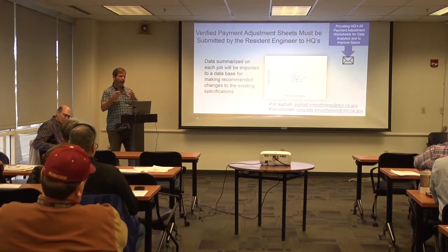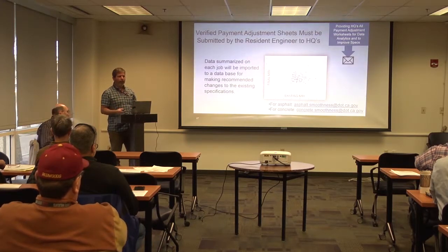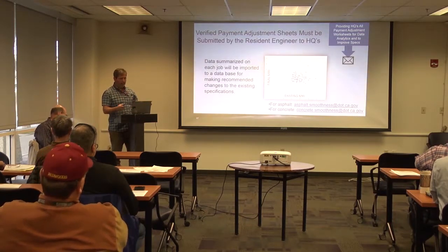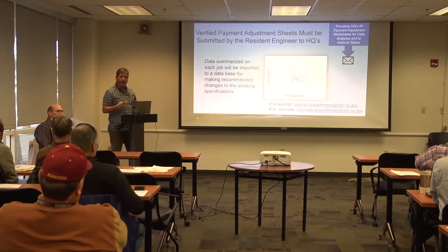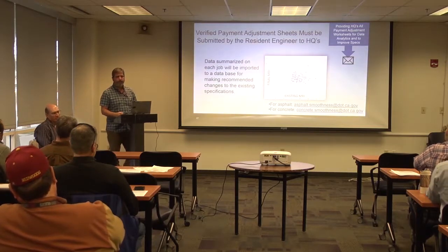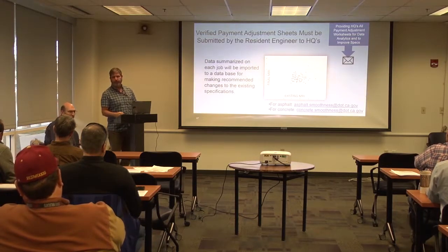We were getting all this data in from a lot of projects, but nothing was aligned, so trying to make heads or tails of it wasn't very feasible. Now we're requiring the contractor to give us all this profile data aligned. If you look at the section 36 specs, they talk about trying to resolve differences between Caltrans and the contractor.